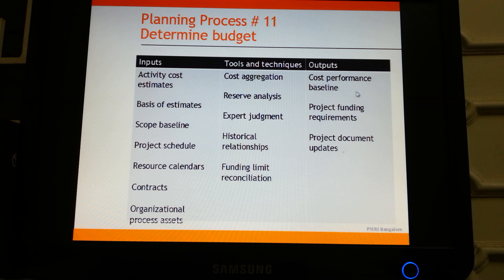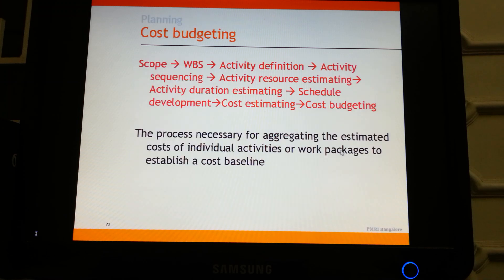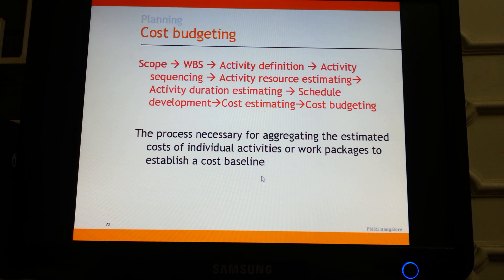The outputs of determining budget are the cost performance baseline, project funding requirements, and project document updates. Cost budgeting is the process of aggregating the estimated costs of individual activities or work packages to establish a cost baseline.